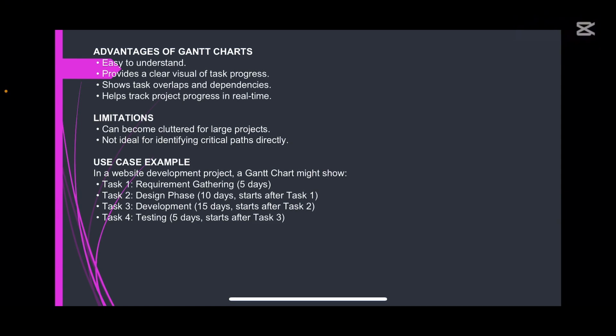So regardless, you are provided 5 days to do your requirement gathering. If your requirement gathering exceeds that 5 days, you cannot just start your design phase till you are done. Say it takes you 7 days to do your requirement gathering and all your findings, your design phase will start after those 7 days. That means you've added 2 days to the project time, which will be detrimental to both you and your clients who contracted you to create the website.